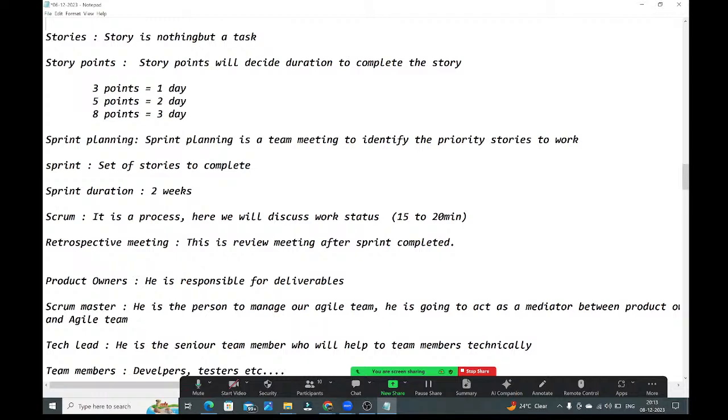And once it is finished, again you need to change the status. Suppose a developer is there, what will the developer do? From open, the developer will put it in progress. Once development is completed, he will assign it to QA and change the status, moving it to testing. After that, a PR is raised. Once the PR is approved, he will close it. He needs to change the status to closed, then only the client will understand the story got finished. Like that, at every stage we need to change the status in the story, then only the client will understand where we are in that story.